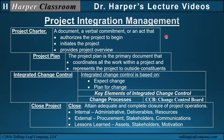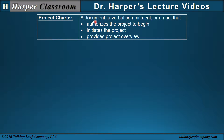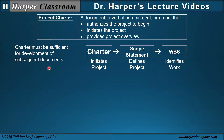Let's start with the Project Charter. The Project Charter is a document, a verbal commitment, or an act that authorizes the project to begin, initiates the project, or provides an overview of the project. The Charter must be sufficient for development of subsequent documents — it must contain enough information to direct the scope statement and the Work Breakdown Structure (WBS) that identifies the work to be done.